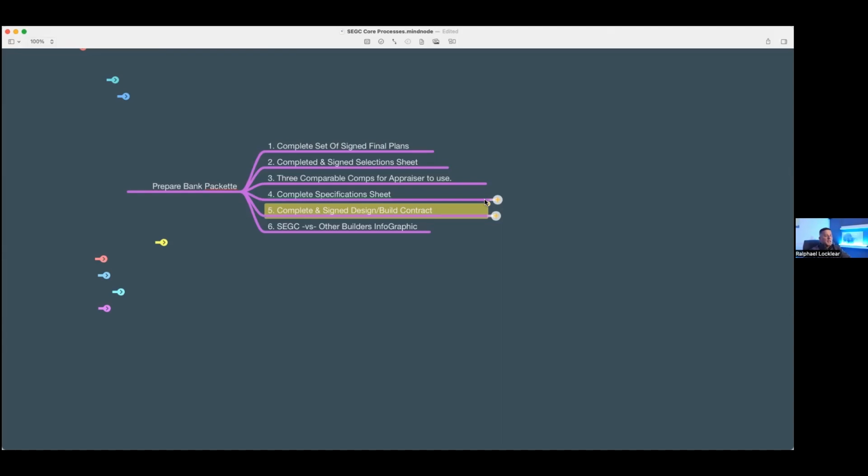And we can't give this stuff away, because those compaction tests are running us $800 to $1,000 a pop. But we're doing 3 or 4 of them at various stages. That's $4,000 we've got to add to the bottom line. When you don't have to do that, guess what most folks are going to do? They're going to cut it. But then when something goes wrong, they don't have themselves covered.